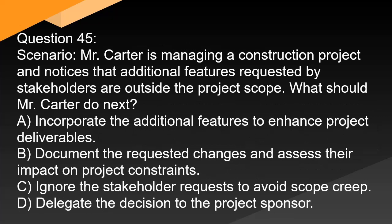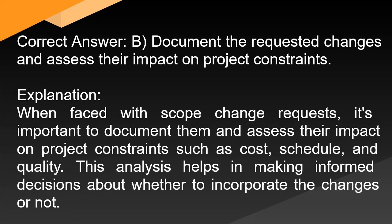Question 45: Mr. Carter is managing a construction project and notices that additional features requested by stakeholders are outside the project scope. What should Mr. Carter do next? A. Incorporate the additional features to enhance project deliverables. B. Document the requested changes and assess their impact on project constraints. C. Ignore the stakeholder requests to avoid scope creep. D. Delegate the decision to the project sponsor. Correct answer: B. Document the requested changes and assess their impact on project constraints. Explanation: When faced with scope change requests, it's important to document them and assess their impact on project constraints such as cost, schedule, and quality. This analysis helps in making informed decisions about whether to incorporate the changes.